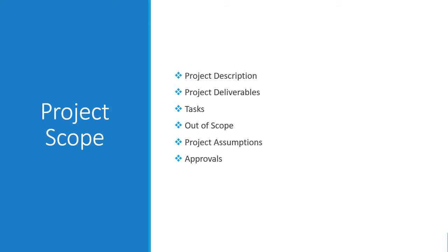Next is project assumptions. So we had many project assumptions, but I'll give you a few examples, like the organization will obtain all software and licenses within the agreed upon budget. That was one of the assumptions. Next was vendor will supply 24/7 post go live customer support, and we also had a training room, which will be available as needed. So these are 3 examples out of many for project assumptions.